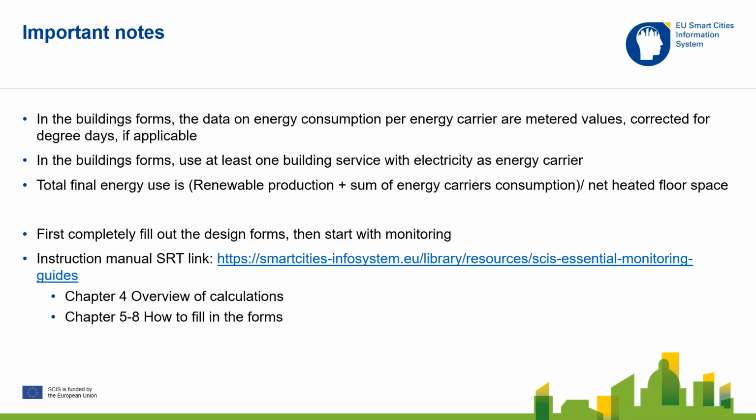Before you open the monitoring, you need to be sure about whether the design form reflects your actual situation. And then it will save a lot of work in the monitoring stage. And you can enter monitoring forms for each year. Normally they are, let's say, calendar years. Sometimes that's inconvenient in the flow of the project, and then it is June from one year to the middle of the next year. Then we are pragmatic and you choose either the first or the second year, but you need to account for the heating degree days, etc.